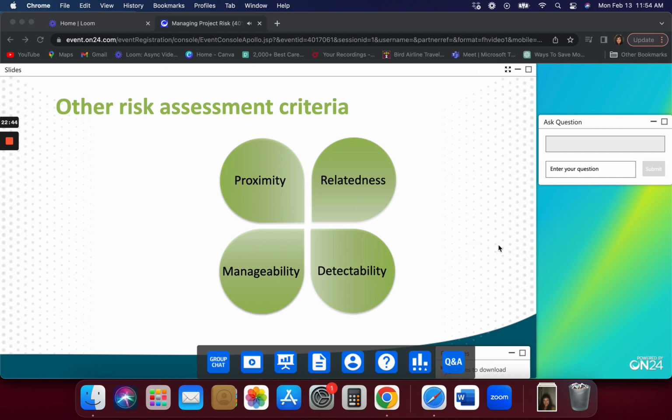So if you, for example, in your cause-risk impact structure, in your risk meta language, found that causes were being duplicated. So a given cause would have more than one risk, each of which could have the same or different effects on objectives. Then you would definitely go for that and address that cause, so that you can then address three risks with one intervention. Or detectability. How easy will it be to see that the risk is imminent?